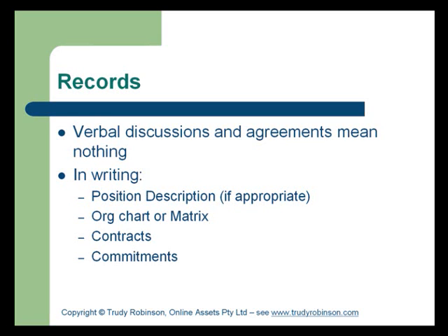As in any type of business, verbal discussions and agreements mean nothing. It is important to document what these resources will be doing, particularly if you're advertising. A full position description is appropriate and will clarify exactly what you require of these resources. An organisational chart or RACI matrix will assist in clarifying exactly what's required of them and who's reporting to whom. Contracts are obviously a formal legal document which will be an ongoing reference in case of any future disputes, and if possible get the commitments for the timeframes, etc. in writing.